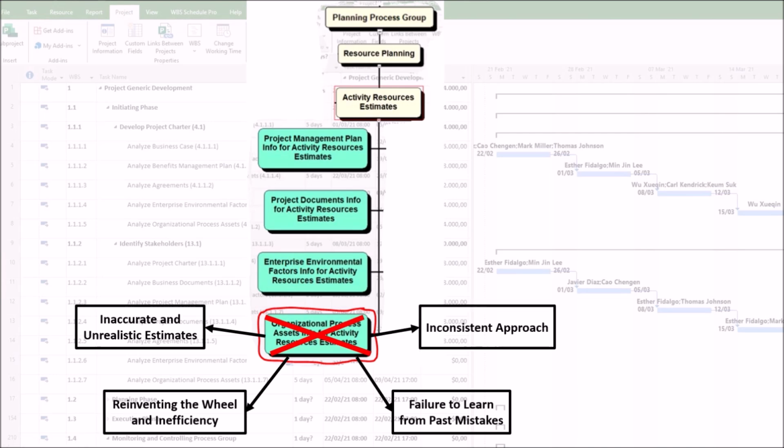4. Inconsistent approach. Disregarding established guidelines is another source of failure. If the organization has a policy of renting versus purchasing equipment and the project ignores it, the estimate may be financially unsustainable. This leads to nonconformities, audit issues, and wasted resources.